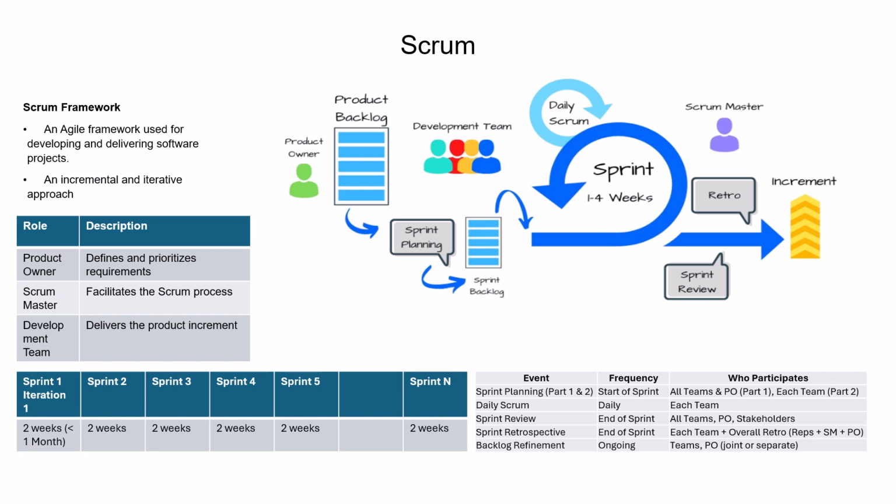Every day they will have a meeting which is called Daily Scrum. In the Daily Scrum the team meets for 15 minutes only, maximum 15 minutes, and it's kind of a status reporting. Everybody in the team reports: this is what I did yesterday, this is what I'm going to do today, and these are the issues that I have. So everybody hears the others, they understand and communicate the status and who's working on what, etc.